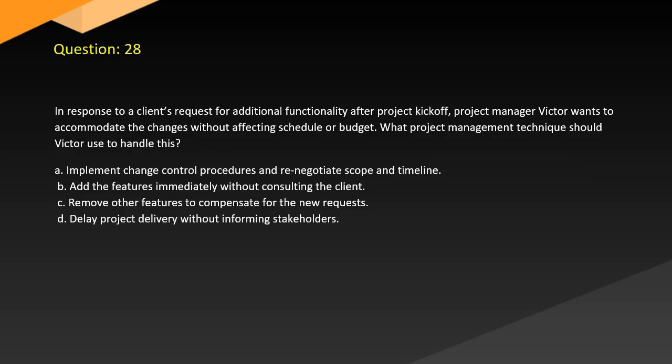Question 28. In response to a client's request for additional functionality after project kickoff, project manager Victor wants to accommodate the changes without affecting schedule or budget. What project management technique should Victor use to handle this? A. Implement change control procedures and renegotiate scope and timeline. B. Add the features immediately without consulting the client. C. Remove other features to compensate for the new requests. D. Delay project delivery without informing stakeholders.